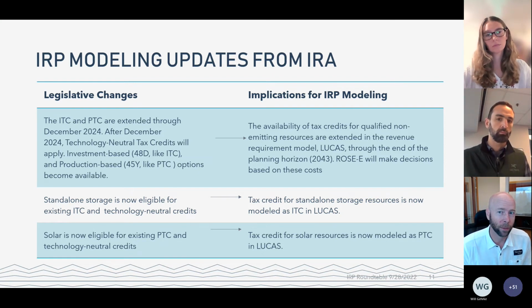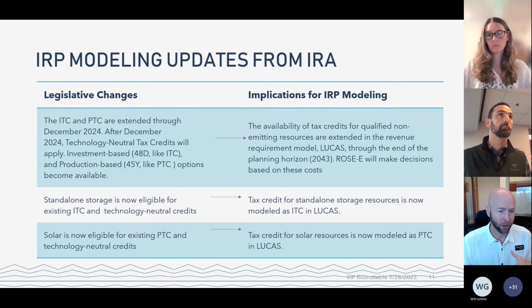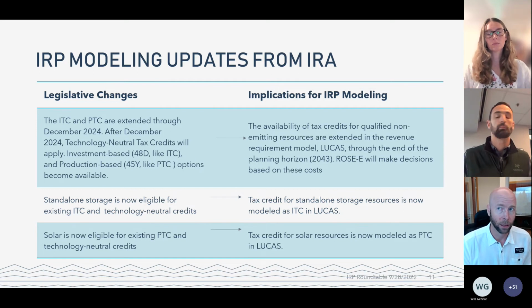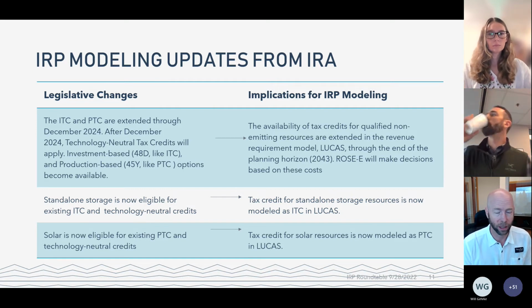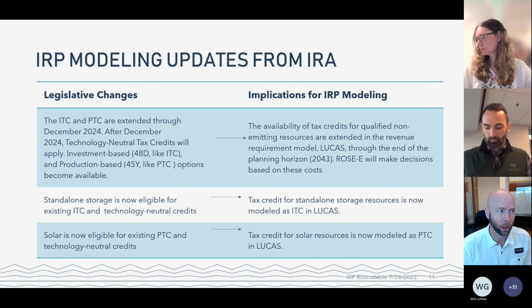I think one thing that jumped out to me, and what I heard you say, is that we are going to bump things forward to like 2036, if that would be inside the horizon. Or I wasn't sure about that last comment, if you're saying no, we're not going to do that, to make sure things were planned to be procured so they could be built before that safe harbor expired, which I would agree makes sense, including because there's some over-procurement that's going to be necessary to deal with failure rates and delays that are not controllable by anyone.